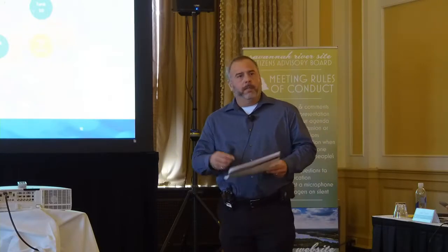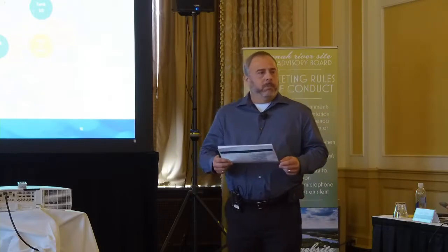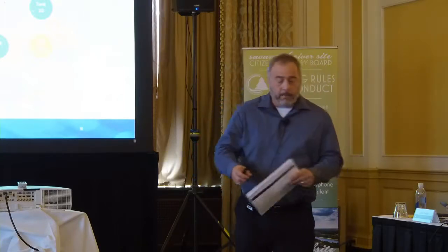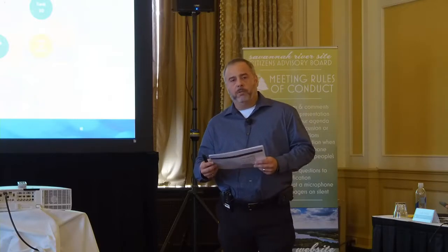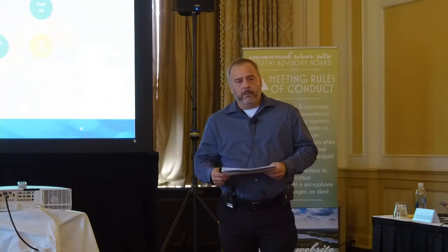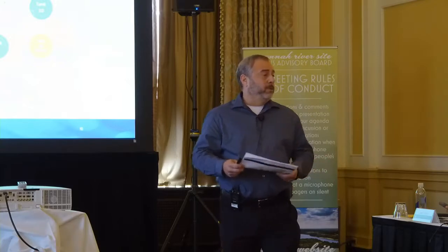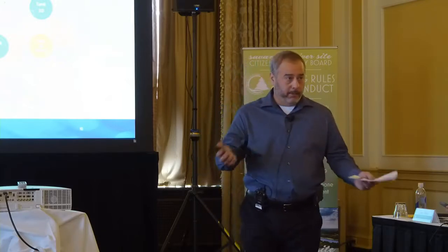That one's due in the end of November. We were working the arguments as to why we've reached bulk waste removal complete in Tank 10. Right now, we've nearly got our presentation complete and finalized, and more than likely, we will be delivering that to those two parties sometime mid-October timeframe. After that, we have a commitment that was recently agreed to begin our bulk waste removal efforts over in Tank 9, which is obviously our next tank that we're going to treat through ticker.